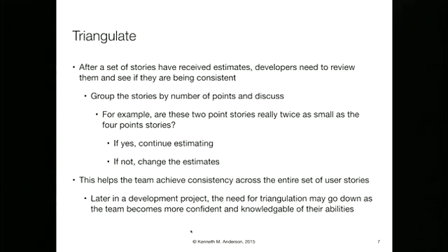And also, as you go forward, you will have done this kind of big Uber session where, at the very start, you say here are all these requirements, let's get them all estimated. As you move forward, you're going to be getting changes to stories, new stories, and existing stories are going to go away. So as you do this in between iterations, you're going to be doing it for a much smaller set of stories. You finished one iteration, you're about to start another, the user gave us 5 new stories, we've got to get them estimated. Those subsequent planning sessions will be much shorter, much quicker, and you'll get into a flow on it.